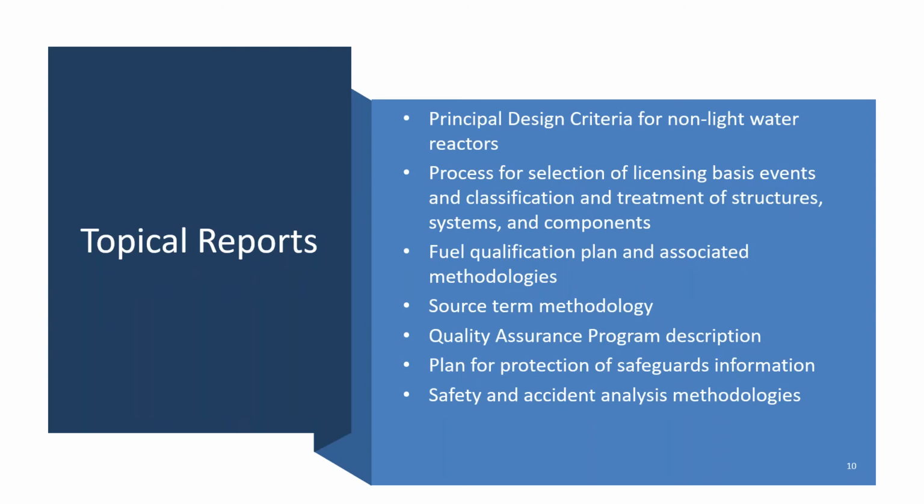For topical reports, the items that we identify are listed in this slide, and I'll expand a little bit upon each one here. The first one is the principal design criteria that establishes the necessary design, fabrication, construction, testing, and performance of safety significant structures, systems, and components, or SSCs.